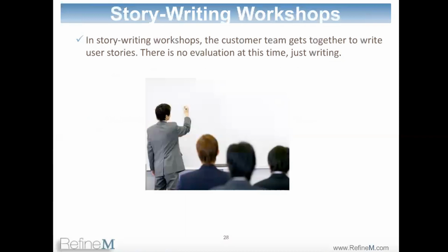The most useful technique that I find is user story writing workshops. That's where all the right people come in the room, and they just start writing user stories. And this is very useful during the initial stage, what I call product planning or release planning, where all the business people who are related to this project or product, the product owner, business analyst, only business people.